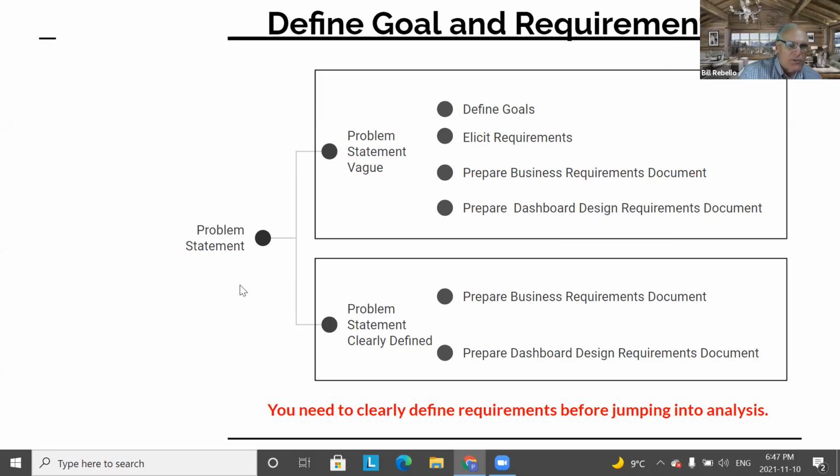Yeah, I think in our cases, with the projects, and I think this works, we use agile. In other words, we find out what the customer wants. We do some visualizations, show it to them the next week, get feedback, and then we change it. We do three or four iterations before we get to the final product. So I think you're absolutely right. Let the customer see your work before you finalize it.